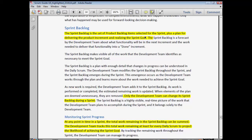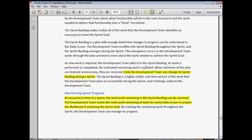Only the development team can change its sprint backlog during a sprint. Once you've started a sprint and started developing, the development team are in full swing and any change could affect their progress. Once they've focused on a specific set of items, it's only right that they have the say-so about whether those items change — otherwise it makes the plan void. It's not that the plan shouldn't update; in a sprint things can change. But it's up to the development team to negotiate with the product owner, and they have the final say in whether items can change in the sprint.